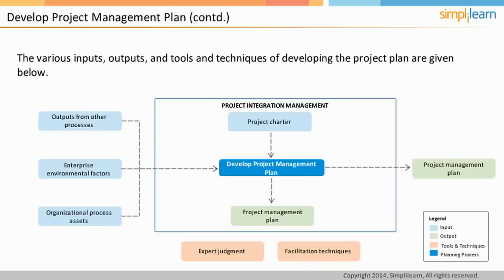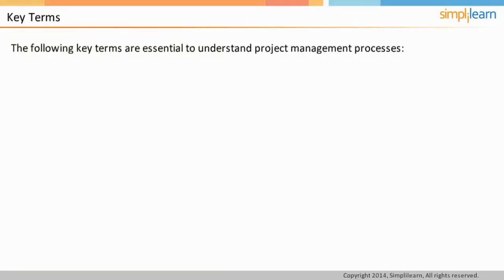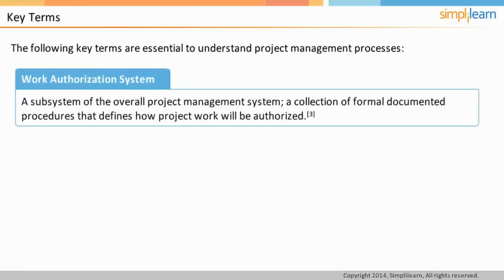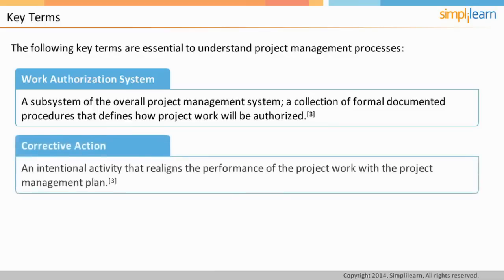Let us look at a few key terms to understand project management processes. The first is the work authorization system — there should be a formal process of authorizing work within the project. So whether it is internal team members or project contractors, there should be a formal process of giving go-ahead to start work on the project. The next two related terms are corrective and preventive action. Corrective action is any action taken to bring expected future project performance in line with the project management plan. For example, if a project milestone is delayed, as a corrective action, you include additional resources to ensure that the final project deadline is not delayed.